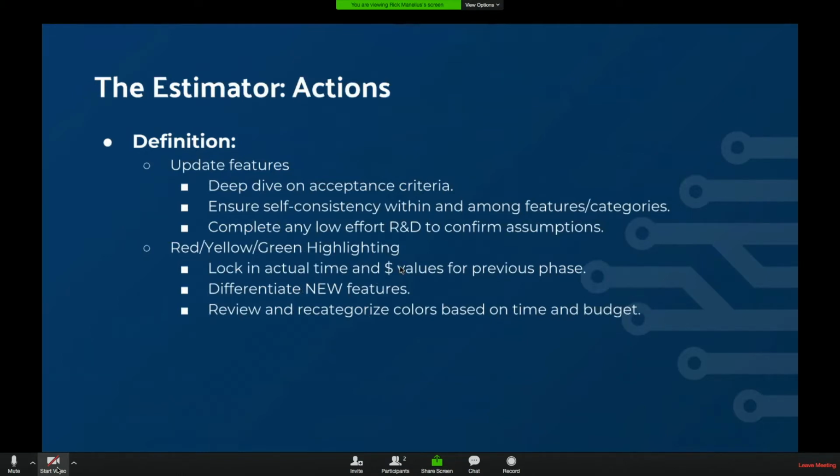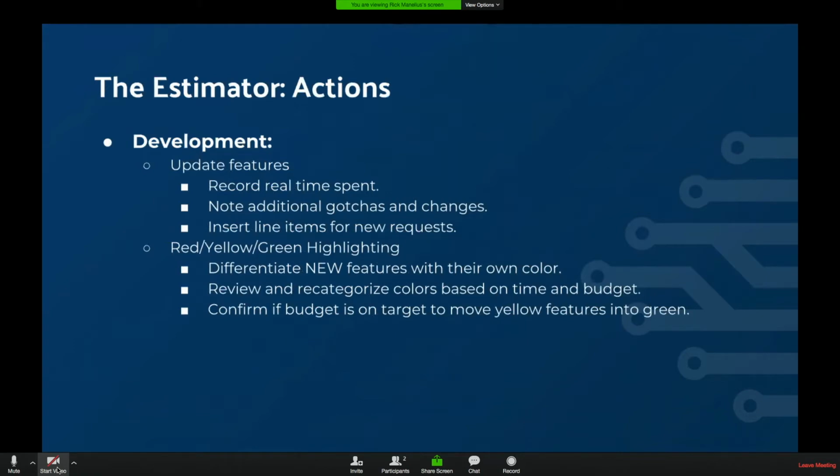And that's when you can start to say, okay, we started off thinking this was a $60,000 project. It got up to about an $80,000 project, but then we worked with you, got it down to about a 50. And now let's refine the acceptance criteria to meet that objective to get to that 50K level. And then in development, you update those. So if you use systems like Jira or time trackers like Harvest or Toggl or whatever, you can actually link to that feature on that spreadsheet off to your time tracker.